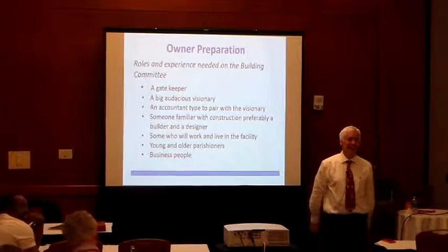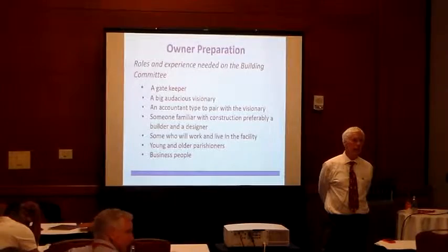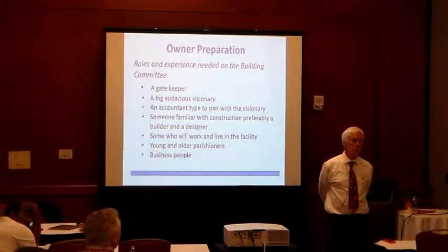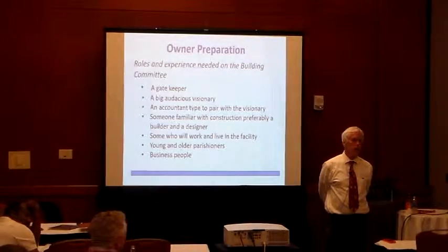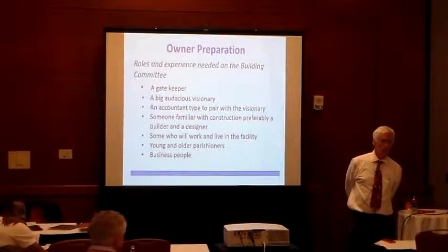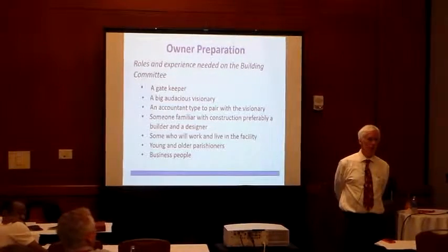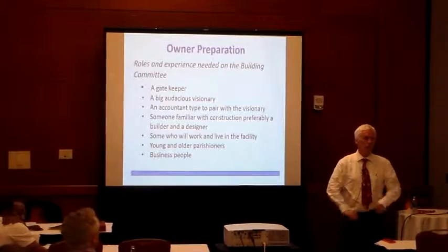Just two adds to that. You can assign a subcontractor under CM to the contract, working with the CM at risk. So if you have a parishioner who is in a trade that you want to include and you bid the package, you can either assign it to him or put him in the bidders list, and you don't have to take the low bidder.